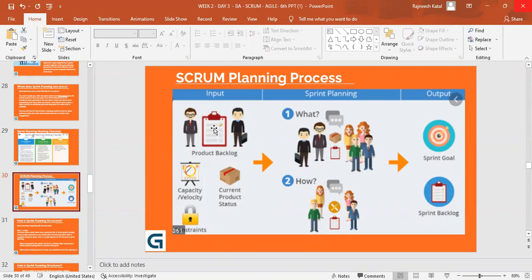If tomorrow the Scrum Master and development team can also come and add, delete, update this sheet, there is no uniformity, right? Some person can just go and remove some of the line items or requirements which might be important. So that is why it is a very important repository of requirements. That's why it's called the product backlog, and only the product owner can update that.